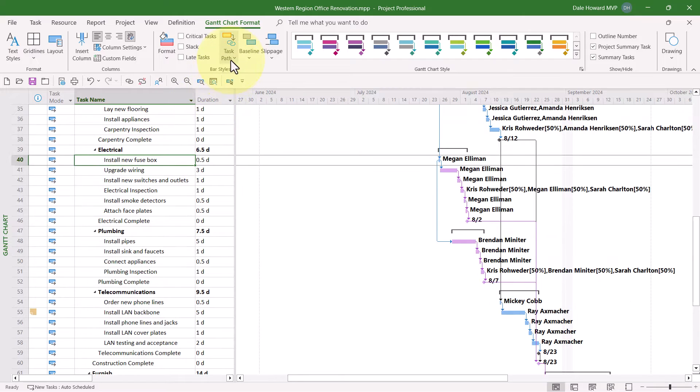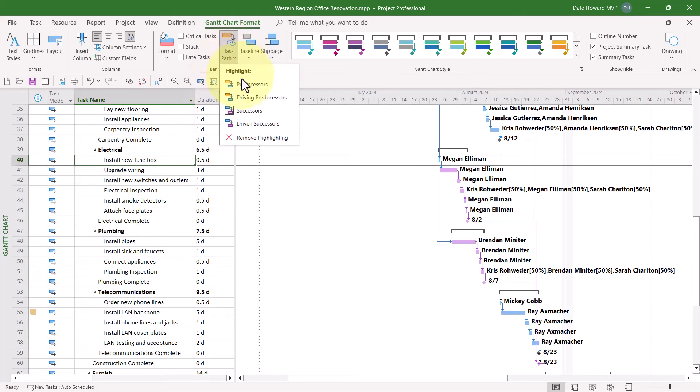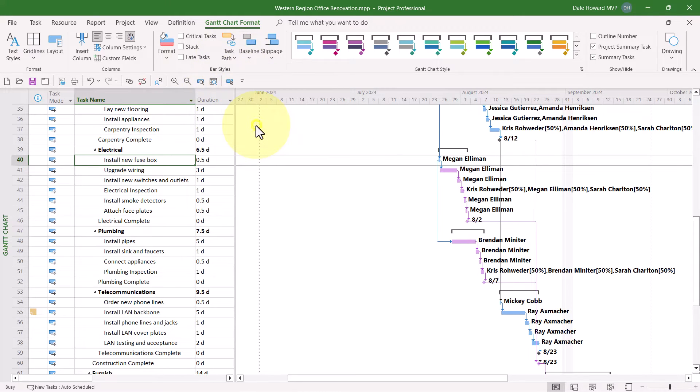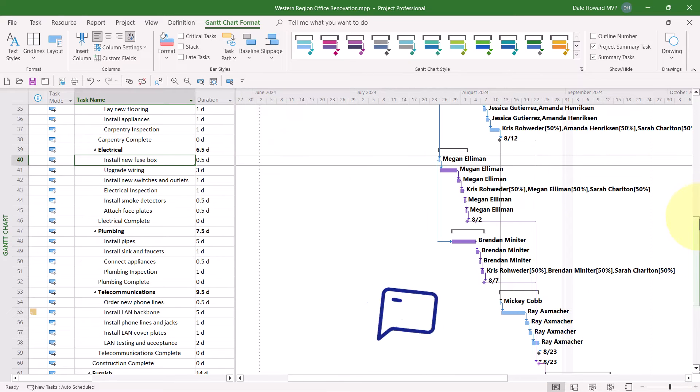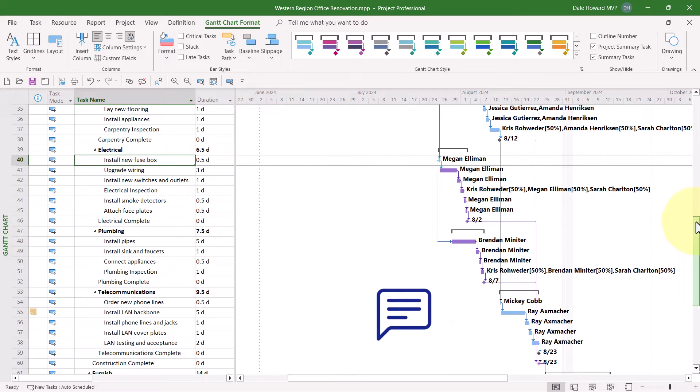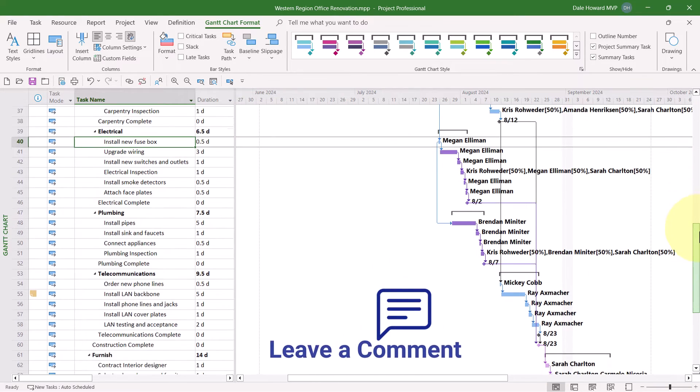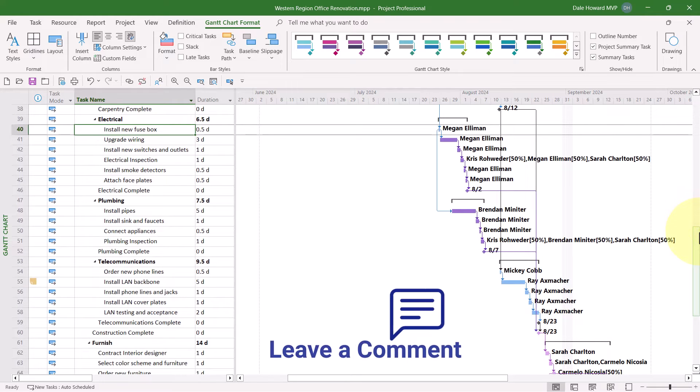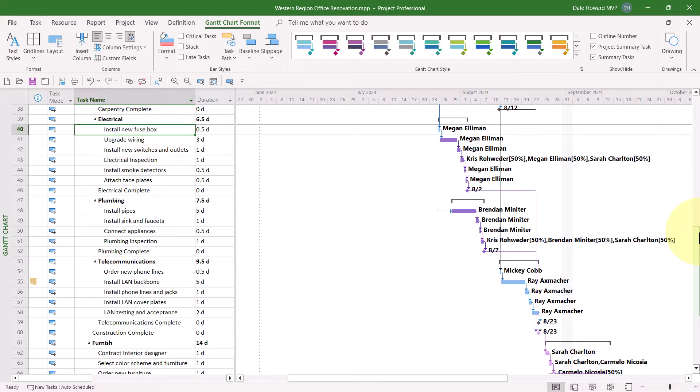And then finally, let's take a look at Driven Successors. When I select this option, notice that the light purple Gantt Bars are now a dark purple color. These are the tasks that are directly driven in Start Date by my selected task number 40, Install New Fusebox.